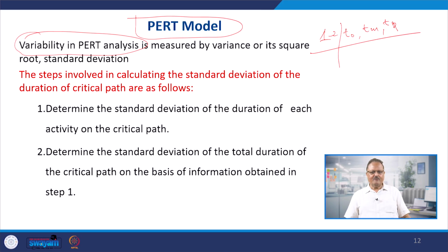So first of all, you have to find out the possible times which can be taken for an individual activity, and calculate the standard deviation involved in that time series of completion of that activity. This way you have to calculate the standard deviation of the duration of all the activities. So that would become the standard deviation of the project as a whole, and that you have to use in developing the critical path. So read what is given here.